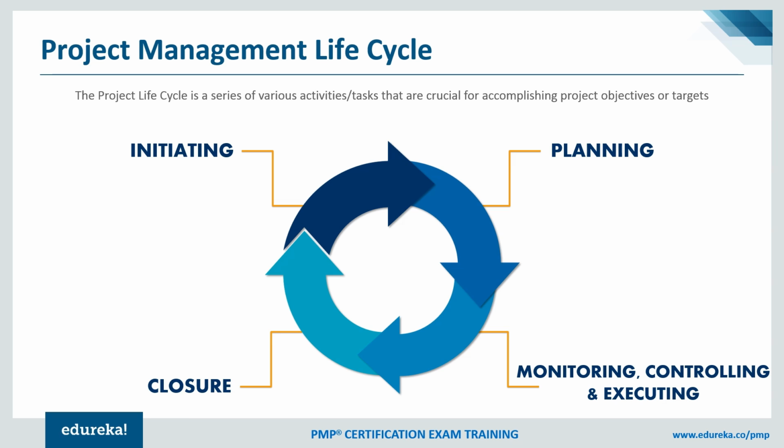The word baseline means that these are plans approved by the management, and after the baselines are done, any changes to that plan will have to follow a change request process to the management. The project manager is an authorized person who can carry out those changes, but once the baselines are signed, the authority of change goes from the project manager to senior management. The senior management responsible for responding to change requests is called the change control board, in short, a CCB.